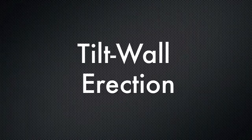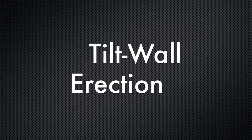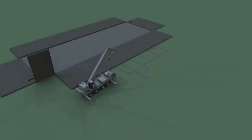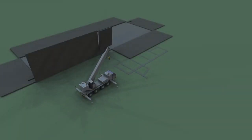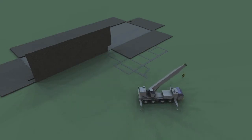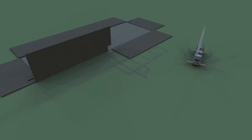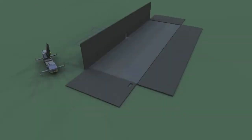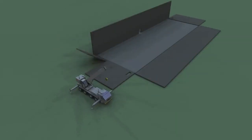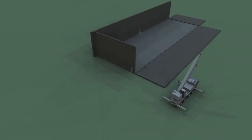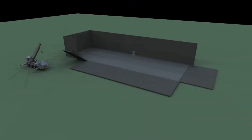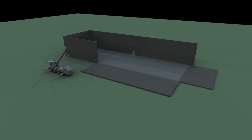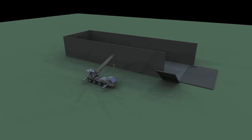Now we'll move to tilt wall erection. Once the slab has fully cured, erection of the tilt wall panels will commence. A large mobile crane will be used to erect the tilt wall panels. Erection will begin on the east side of the building and will continue in a counterclockwise fashion until the building's tilt wall panels have been fully erected.